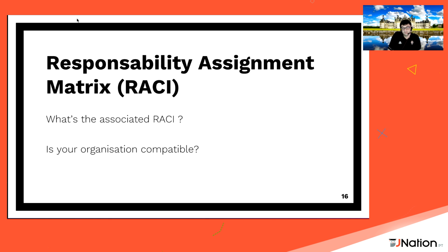To be completely honest, it's boring, but it's mandatory to implement that and to check that you have this responsibility assignment matrix before going to production. So check first your current responsibility matrix for your older applications. For instance, if you have application one on JBoss server in a Linux box, okay, what is the current responsibility matrix? And with all the stakeholders, define a new one and say, okay, you are responsible for deploying to production, I'm responsible for developing, creating the artifacts and so on.